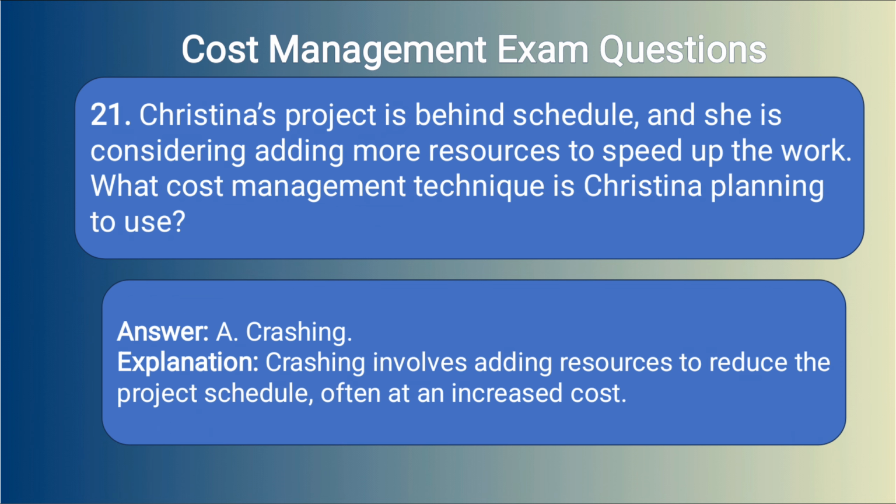Answer: A. Crashing. Explanation: Crashing involves adding resources to reduce the project schedule, often at an increased cost.